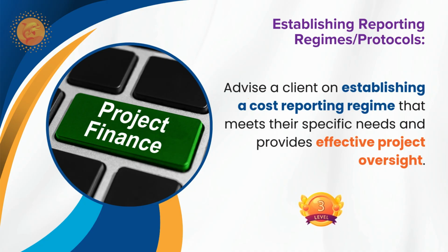As an example: the project budget, payment, variation, approved variation, anticipated variations, claims, provisional sums, and preliminaries. All the data will be included in the cost report, along with the forecast of the budget and cost to complete. Those are the important aspects to be included to get effective project oversight.